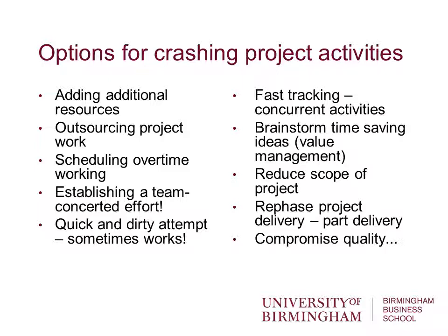A call to arms. We can do a quick and dirty attempt at trying to cut corners and do things which might not be giving us the best kind of outcome, but nevertheless get the project finished on time. And that, as I said, sometimes works, sometimes infrequently doesn't. We can fast track by having activities running simultaneously rather than at different periods of time. So sometimes there are opportunities for fast tracking activities within projects by shifting them around a bit.